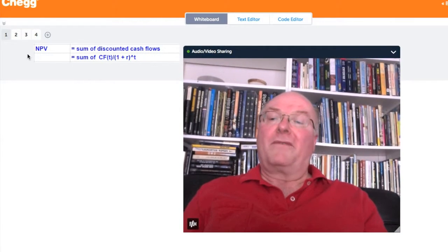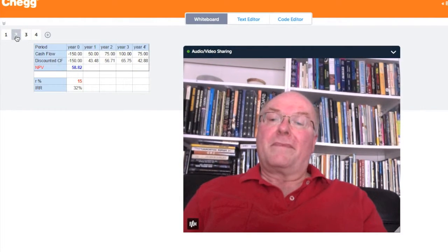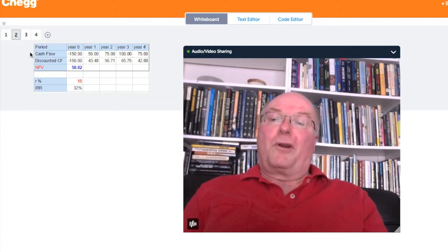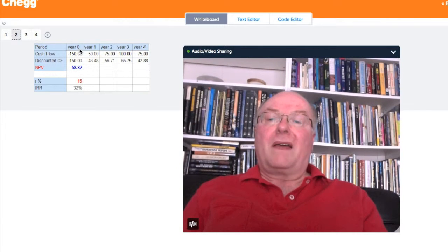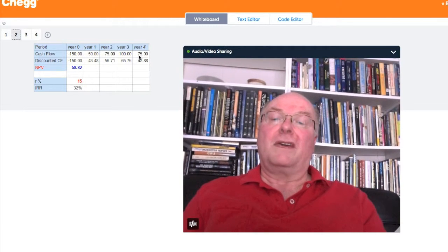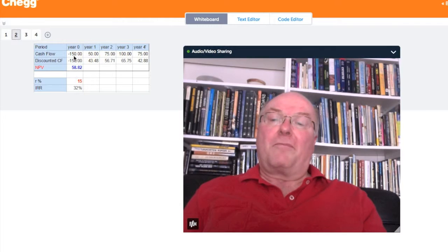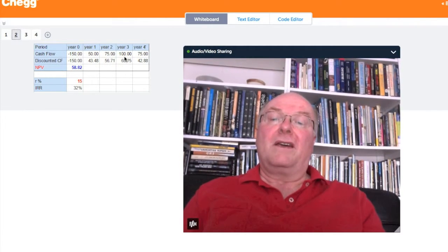So let's just look at a couple of examples. Here we have a simple project. Year 0 is when you have the capital outlay for the project, and then years 1 through 4 are going to be the returns for the cash flows for each of those years. So we start in this particular project with a cash outflow in the first period of 150, and it's minus because it's a cash outflow, and then we will have cash inflows in year 1 of 50, in year 2 of 75, in year 3 of 100, and in year 4, 75.